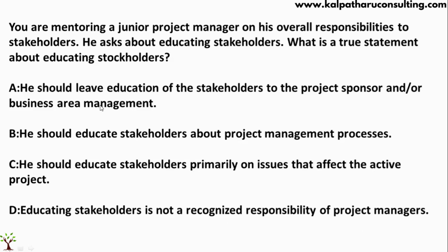So option A says leave the education of the stakeholders to the project sponsor and the business area management. Is it true or is it false? See, the project sponsor and the business area management have their own focus areas, like funding the project and taking care of their own area or protecting the project from any major hurdles. So that is their primary role. The project manager has the role to manage the stakeholders. So A is a false statement regarding the project sponsor and the business area management educating the stakeholders on project management. B, he should educate stakeholders about project management processes.